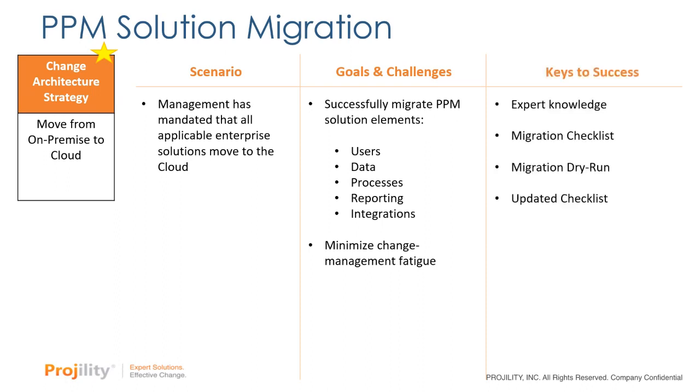So some of the keys to success. For a migration, you're definitely going to want to utilize personnel or solution implementers with expert knowledge of both the on-premise and the cloud version of this solution. That's a big key there. You're also going to want to create a very detailed step-by-step migration checklist. And this is a list that the migrator is going to use to walk through in real time to achieve the migration objective.